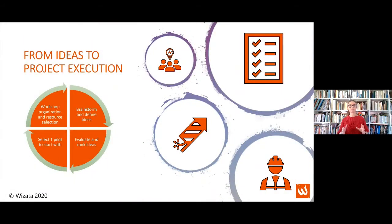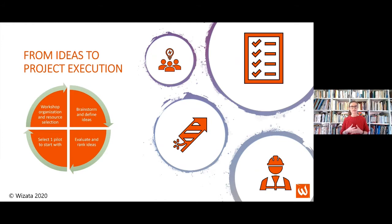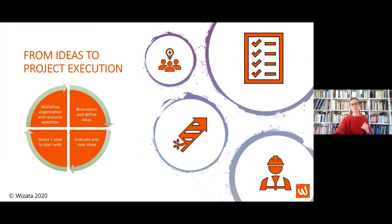We want to move from ideas or problems into project execution. To define a pilot and start the digitalization journey in your company, we have four main milestones: first, workshop organization and selection of resources; second, discussion and definition of ideas; third, evaluation and ranking of the gathered ideas; and fourth, selecting one final project to move forward with.